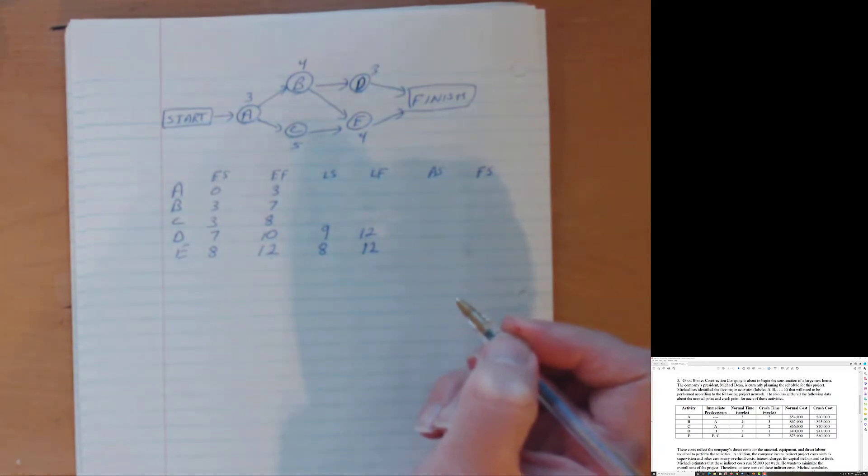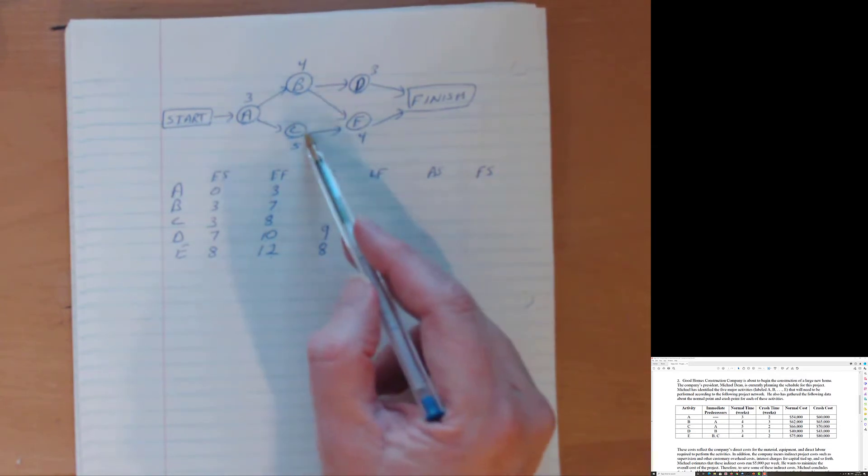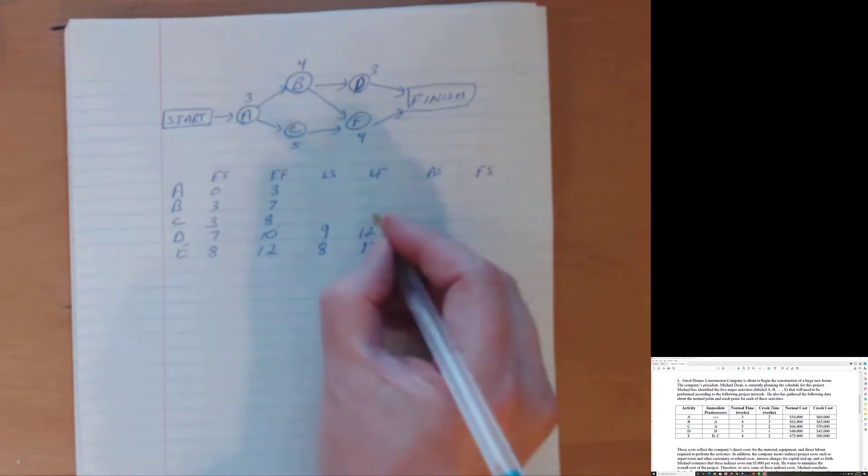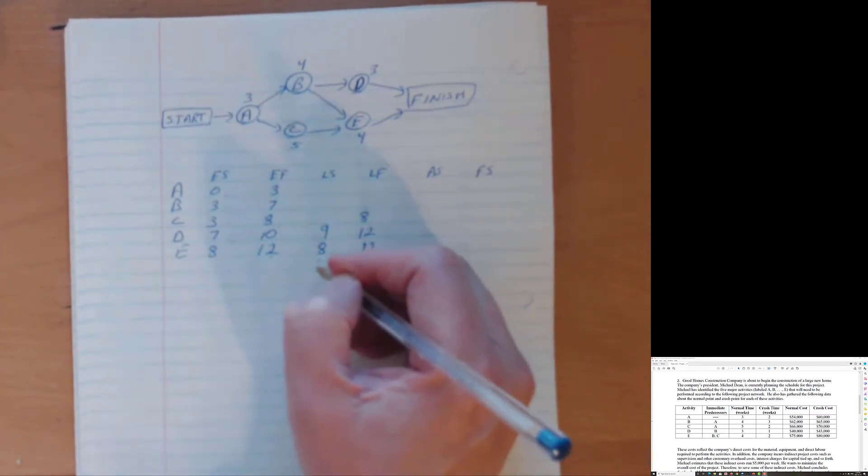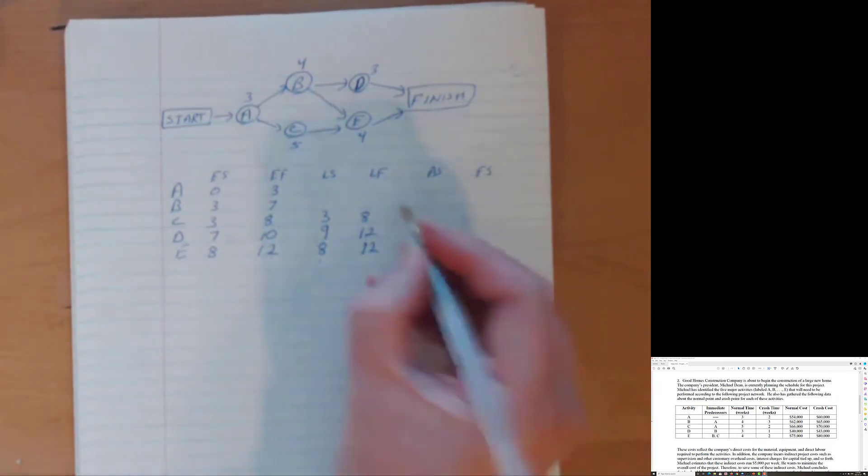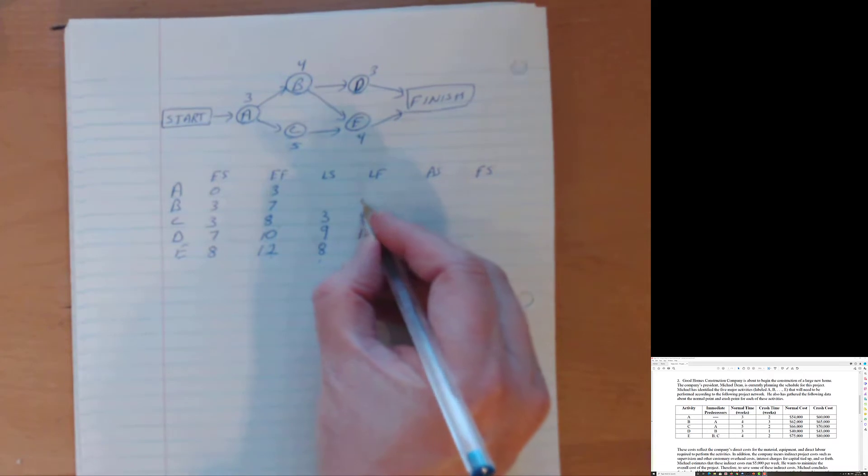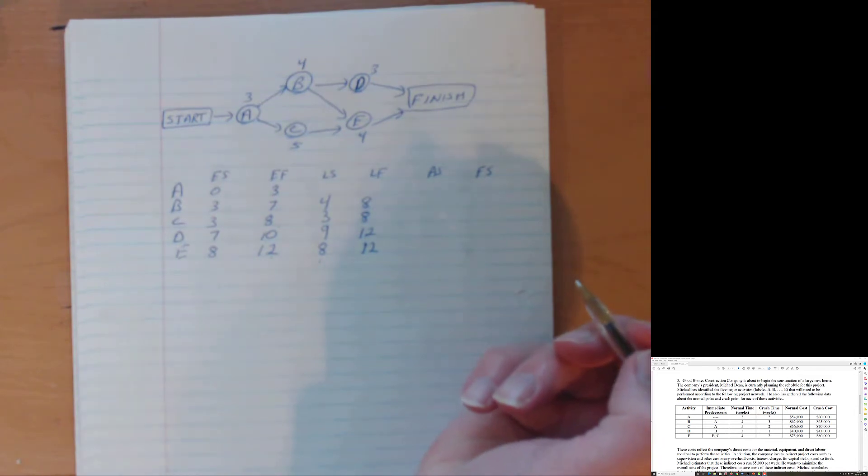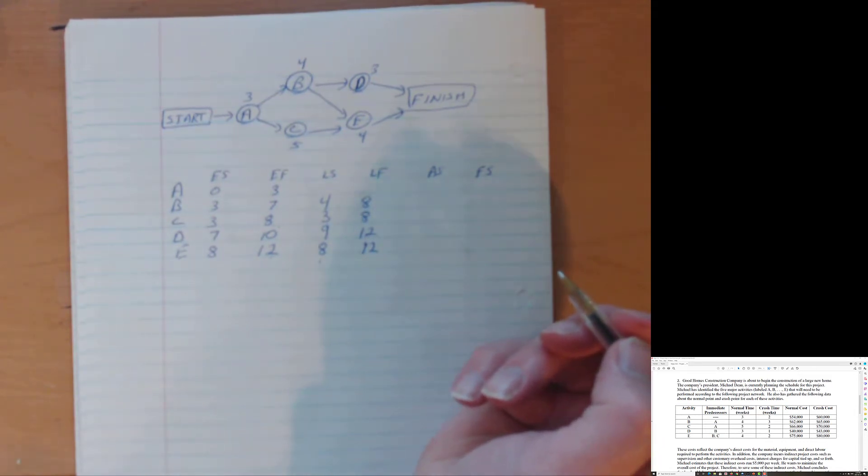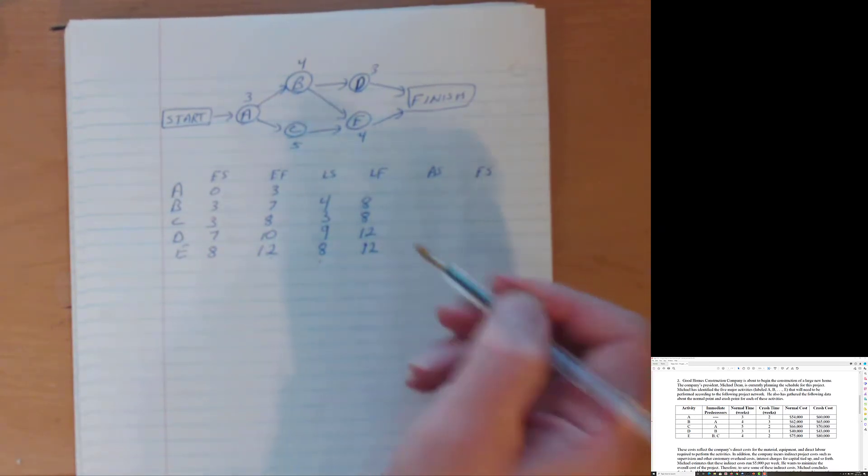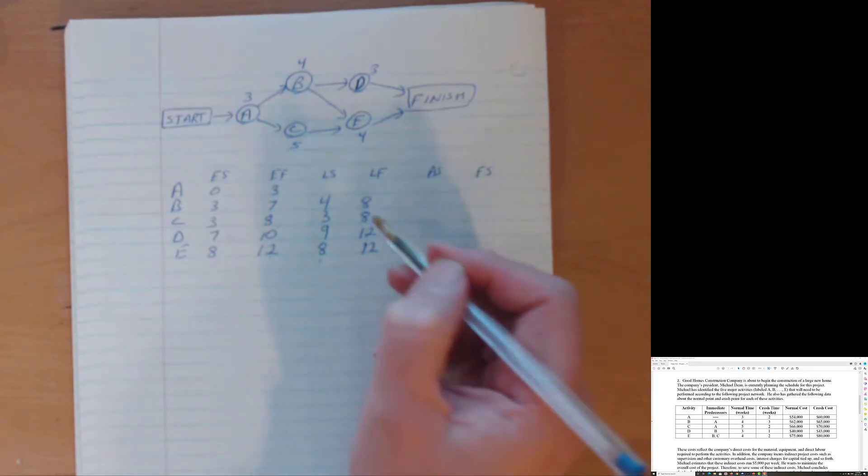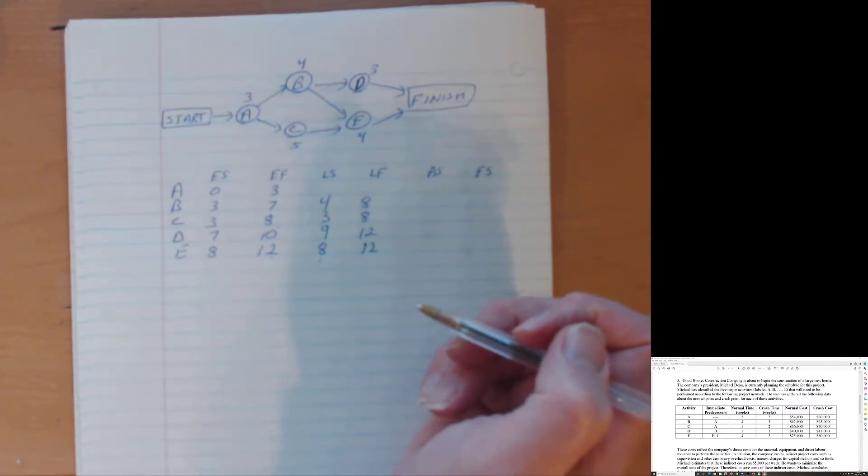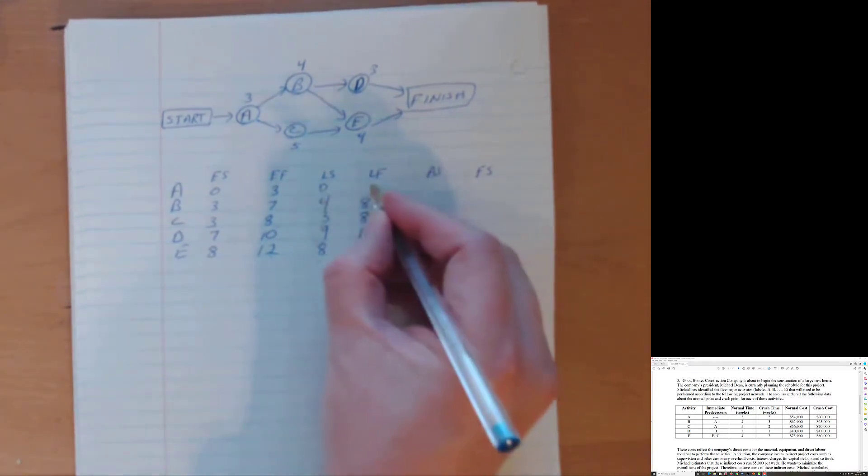Let's look at C. E depends on B and C. And C has to be done by week eight, which means C can't finish anywhere later than week eight. Otherwise, it delays E. And if it delays E, it delays the entire project. Everything's all related. B, however, B also is an immediate predecessor to E, but it actually doesn't have to finish until week eight as well. But so because it takes four weeks, eight minus four is four. And so B has a little bit of a later start than C. And telling us now that we know that C is on the critical path. We know E is on the critical path. We know Bravo and Delta are not. A is on everybody's path. So A must be on the critical path as well.